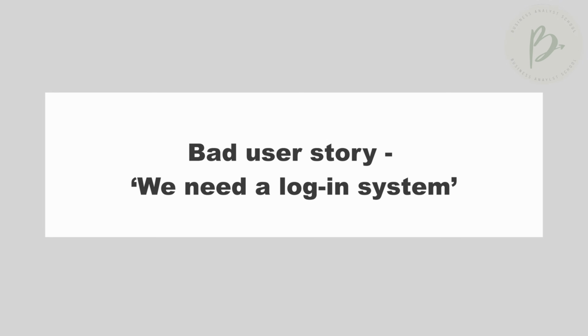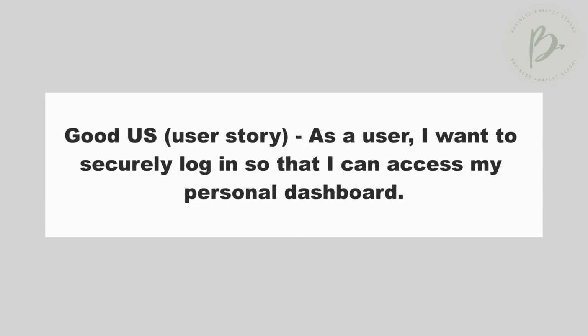So let's look at an example of a bad user story. A bad user story is: we need a login system. Full stop. That doesn't really tell you who needs the login system, what they need it for, or why they need it. Let's represent it as a good user story. Here it is: as a user, I want to securely log in so that I can access my personal dashboard. Simple. Okay, so that's one example of a good user story.